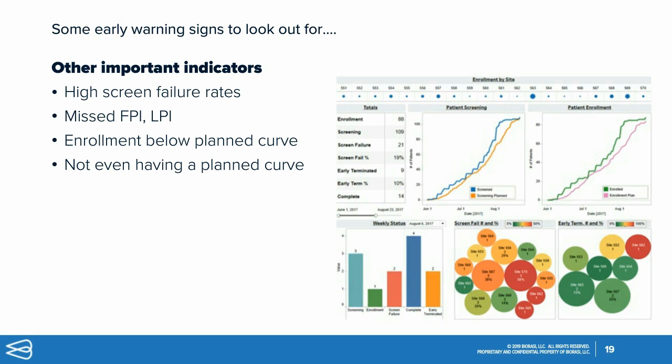So what we ended up doing was spinning up what we call the study navigator group, and that whole group was just dedicated to helping the subjects schedule their visits with the site. And that alone dropped the screen failure rate from 80% down to about 35 or 40%. So, whereas the issue looked like it was enrollment, the issue actually was in screening. The sites were doing their job as far as identifying patients, but it was just the complex screening procedure that was causing an issue. So looking at that and making sure that you note that as a red flag.